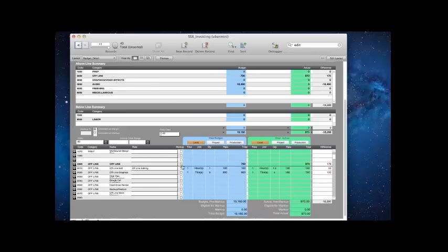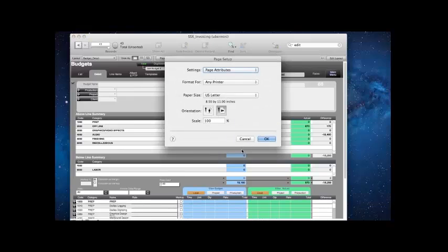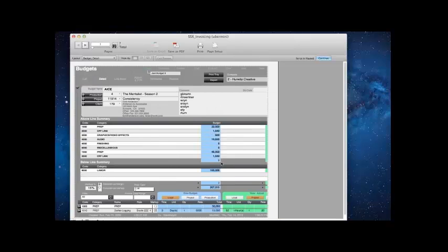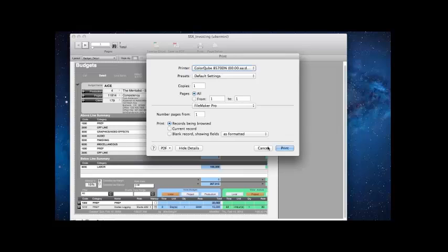So I budgeted for offline 700. It turned into 870, which is a difference of 170, and so on. And so I want to print that out. I go print this, and this is going to look something like your Excel. Print out.